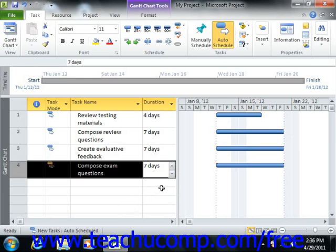Most often, tasks are linked to each other, and one task can begin whenever the other finishes. Setting a task duration and then linking tasks to each other in order of the necessity of their completion versus specifying a definitive start date